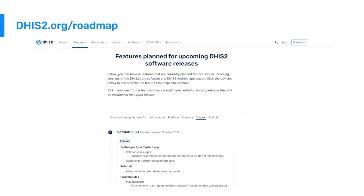Check marks are added to functionality as it is completed so you can be sure it's coming in the planned version. For features that do not get finalized in time for the expected version, they will be moved to the following version and you can continue to follow their progress.